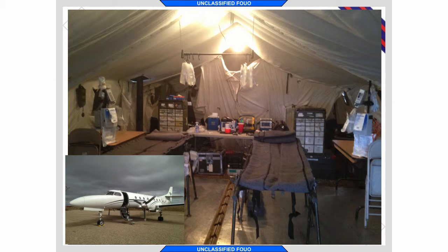So we had a UMS, a good setup there with a doctor at the airhead. We had medics staged forward at our task site, and then we ended up with a civilian contracted aircraft staffed with air medevac crews, the same folks that used to do the repats from Germany. The capability is based in Trenton, but they actually came from all over. So that seven-person team surged in for that key 6-day window when we were actually doing the higher risk operations. Otherwise, we still had the Griffins on site, but if we needed to medevac, it would have just been a call to Orange, just like the rest of the community.